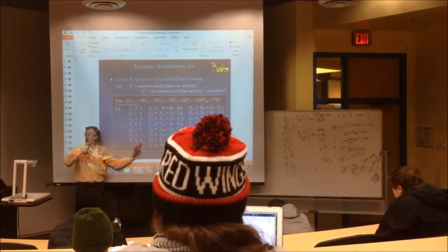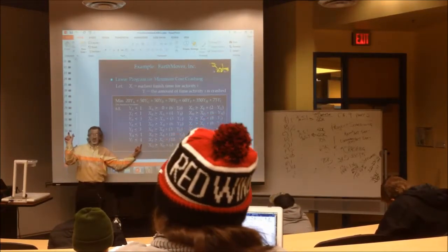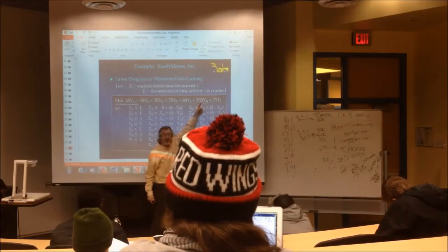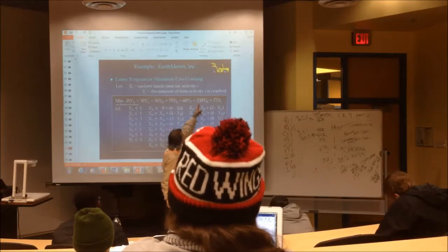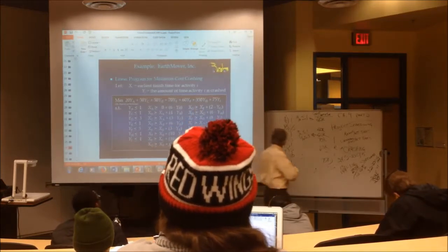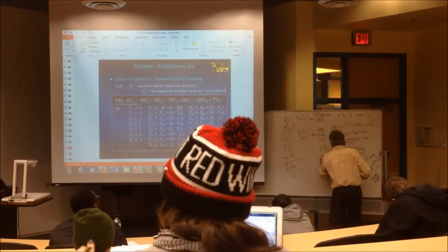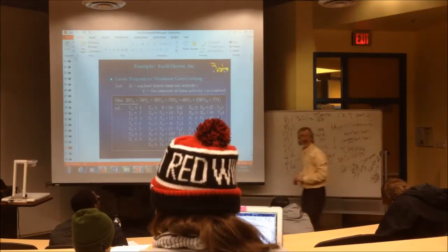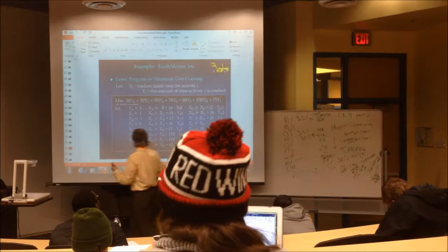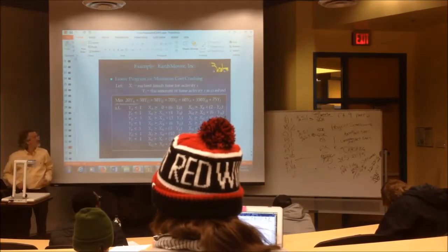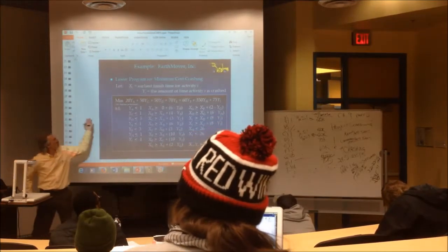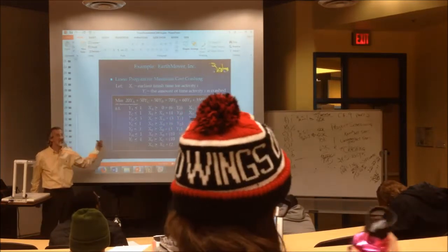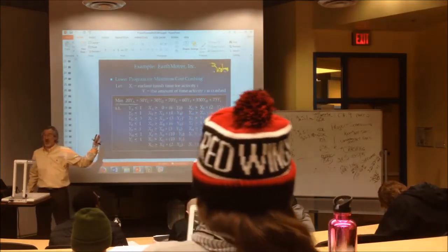And then you use those numbers to divide into the total cost difference to get the per 1 unit cost for each activity. Wow, we didn't do H, but it's 350,000 if we had calculated. If that's crashed, that's unbelievable. 350,000 for one unit of time. Anyway, you can write your objective function based on the column of 1 unit time, and you can write your Y constraints. So those are easy now, right?